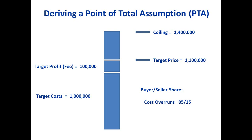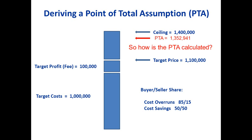You also agree what you'll do in the case that costs are less. If the vendor manages to get it done for nine hundred thousand, you agree to split that saving between you — so they would get nine hundred and fifty thousand, and you'd benefit to the tune of fifty thousand as well. With those agreements in place, you can calculate something called the point of total assumption. In this case, it would be the number you see right there.